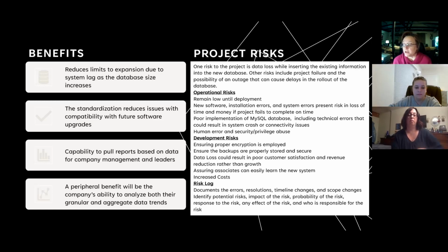The risk log will document errors, resolutions, timeline changes, and scope changes, identify potential risks, the impact of the risk, the probability of the risk, the response to the risk, and any effects of the risk, as well as who is responsible for it. The risk log is initially developed and maintained by the program developers.